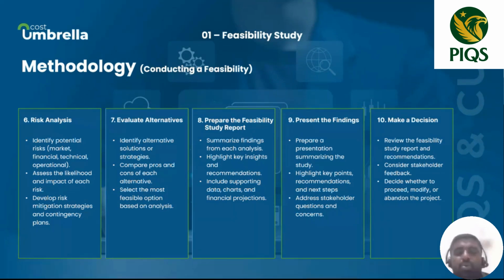If that happened, what is the impact? So this process is called risk analysis, right? Risk means what? You predict something. There's a chance, in reality, it will deviate from what you predicted. So now you predict, and you are expecting some deviation from that. Now you have to check how much it can deviate. What is the impact if it deviates from my plan?